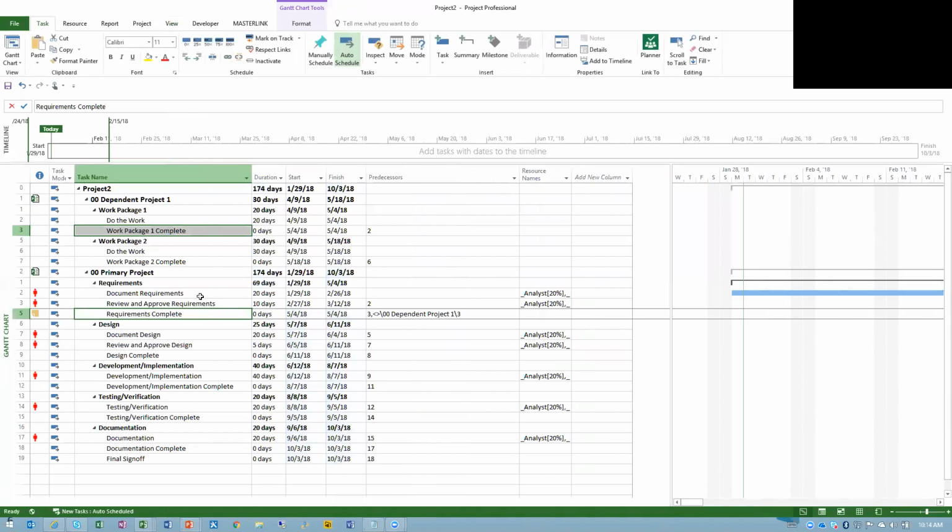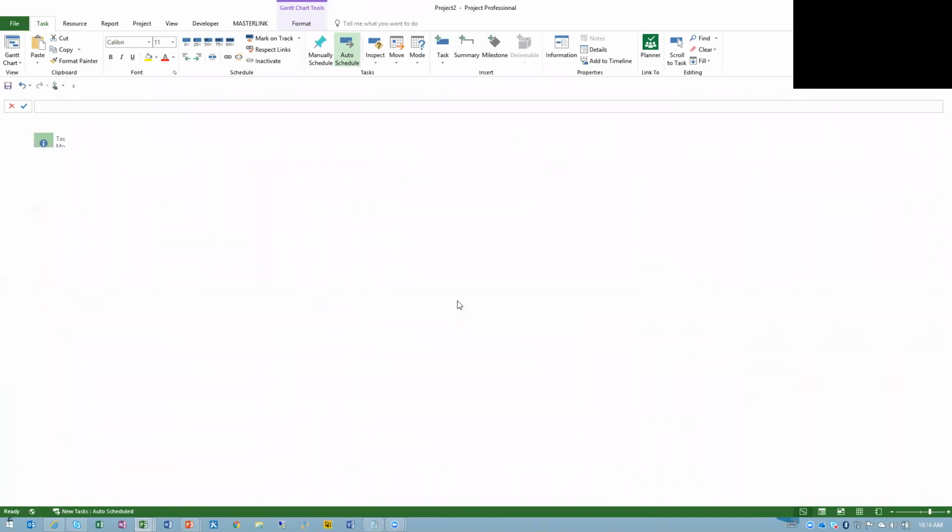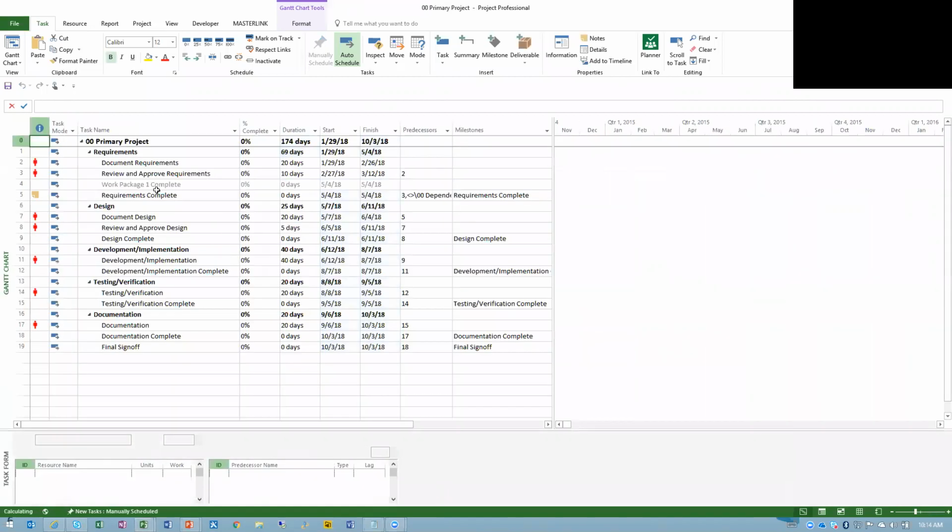So what are some of the recommendations we have for these? Let me show you completing this process. Now that you've finished here, you can close your temporary master called Project 2. And I can just discard my changes for this. I don't need to save. And I get back to my original primary project, and notice now that it's linked. So what are some tips here? You can create these links using that process of opening in the same session and going to New Window, creating a temporary master and creating these links.